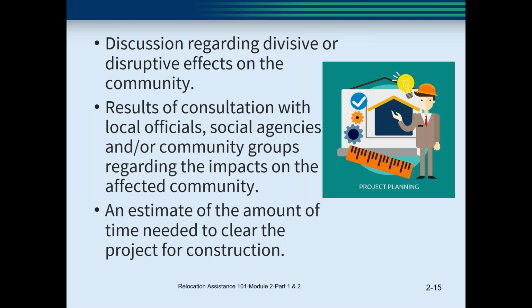You're going to estimate the amount of time needed to clear this project for construction. It's going to be based on what you're seeing out there: the businesses, lack of housing, whatever you might find.